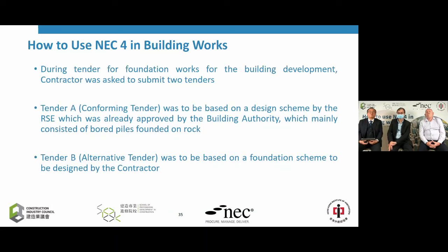Now, for this project at the tender stage, the contractor or the tenderer was asked to submit two tenders. Tender A, what we call the conforming tender, the contractor is asked to submit a tender based on the design scheme by the registered structural engineer. And this scheme was already approved by the building authority.